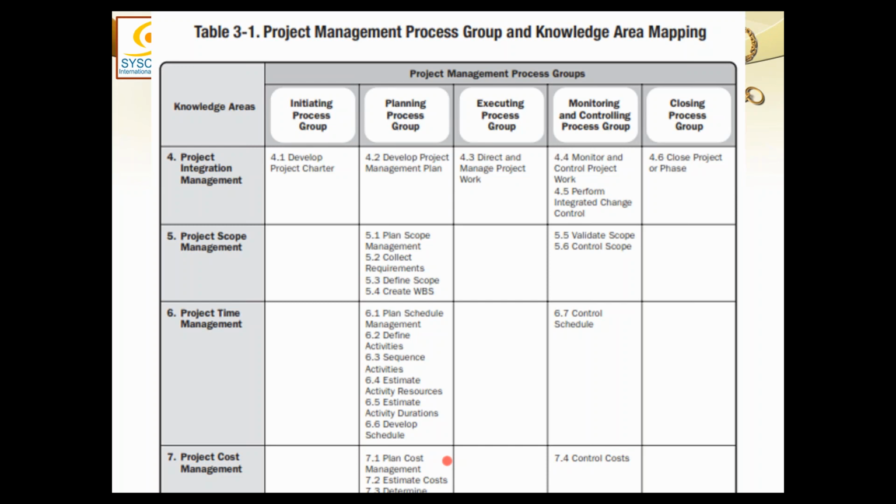So we will have a management plan for everything. And that management plan will describe what this plan is about, who is responsible for this plan, what the rules for this plan are, how this plan can be changed, who will approve it, and things in that context. So if somebody thinks that the management plan is the detailed plan, that is wrong.